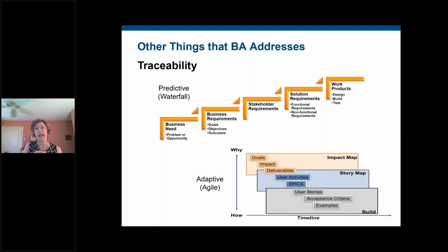But one, it is establishing value, that this thing that we're thinking about creating actually has value, because we can trace it back to the business need. If our business need is to grow our market share, or to increase some efficiencies somewhere, that this is actually going to help do that. And so we document that. We literally draw this line to it.